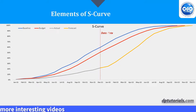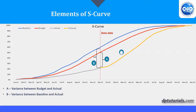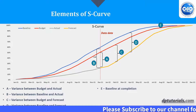On the S-curve diagram: A is the variance between budget and actual; B is the variance between baseline and actual; C is the variance between budget and forecast; D is the variance between baseline and forecast; E is baseline at completion; F is budget at completion; G is forecast at completion.